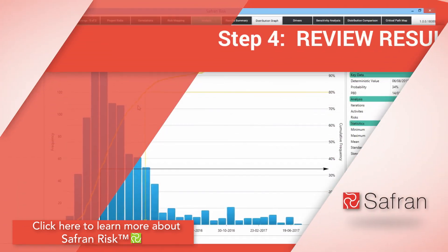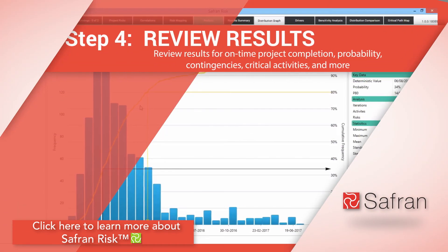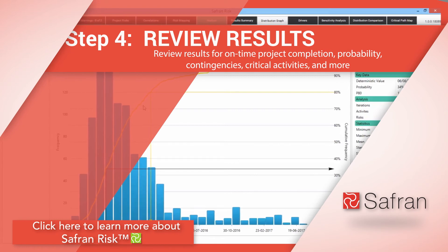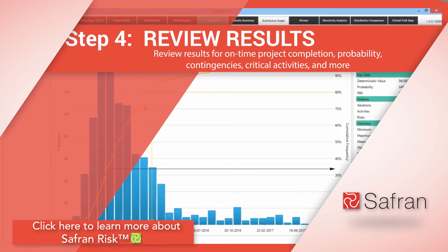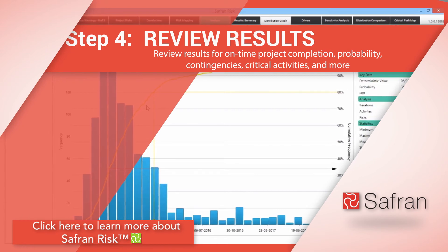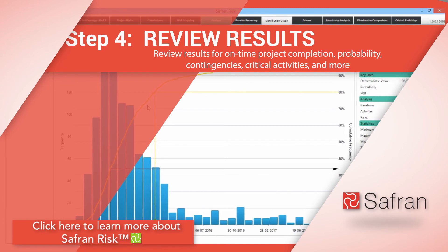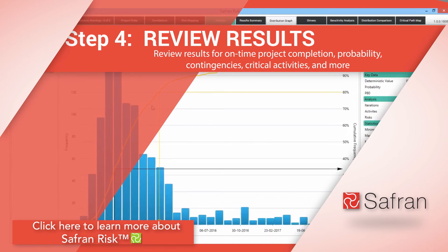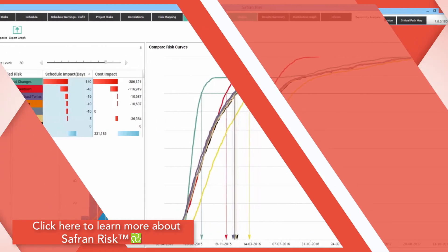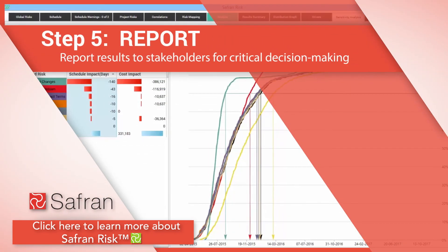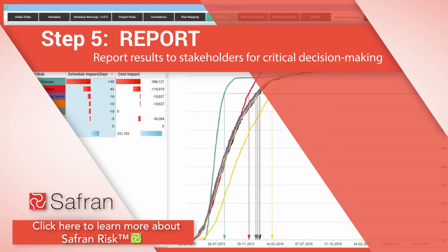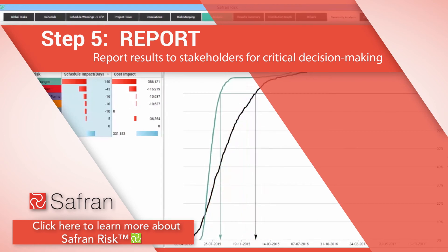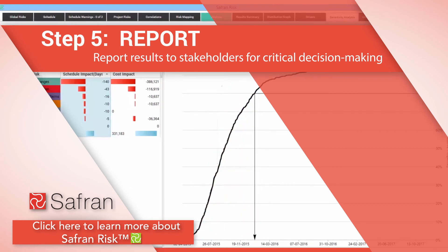The final steps are review results and report. After reviewing the initial results, the risk professional can easily revert back to step two to validate and edit if further modifications are required to explore other mitigation options. Step five, reporting, is a strength of Safran Risk as all the industry standard reports can be exported for inclusion in project status presentations.